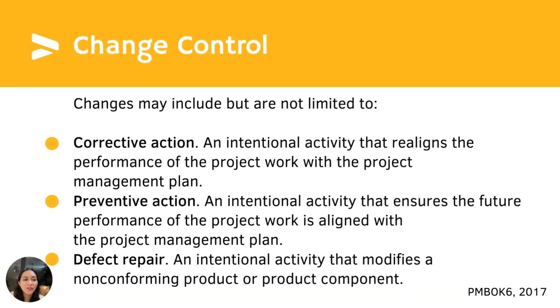So the changes that we're talking about here may include, but are not limited to, these three that were identified in the PMBOK. First, we have corrective action, an intentional activity that realigns the performance of the project work with the project management plan. So, as I have mentioned earlier, there may be some regulations that you need to adhere to. Kaya kailangan magkaroon ng changes to correct what were initially planned and identified in our project management plan.